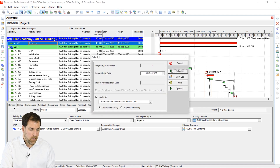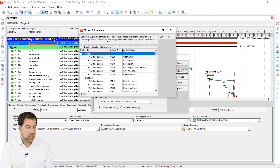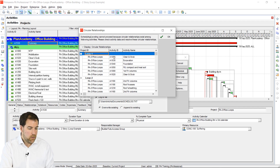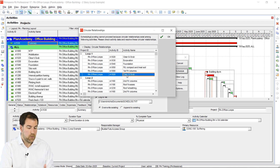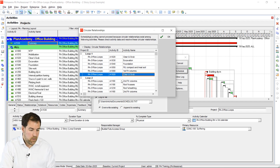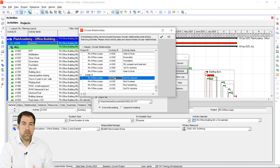I'll click the schedule button and boom — I get a pop-up. It says 'circular relationships — scheduling and leveling cannot proceed because of these circular relationships.' It then lists some of the activities involved. You can see I actually have two loops in this project, so two that I need to fix. Looking at the first loop: it starts with A1020 clearing and grubbing, then goes down to 1030, 1040, 1050, 1080, and the last activity in the loop is 1020 again. So I have linked forward through a bunch of activities and then linked back to A1020. Similarly with loop two, A1160 is listed twice — I've done the same sort of thing.